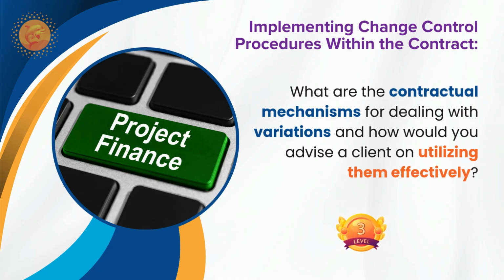Okay. So any further things, how would you value the variations, the method of measurement? Yes, valuation of the variation. If the measured quantity is changed by more than 10% with respect to the specified item quantity in the bill of quantities, then a new variation will be applicable.